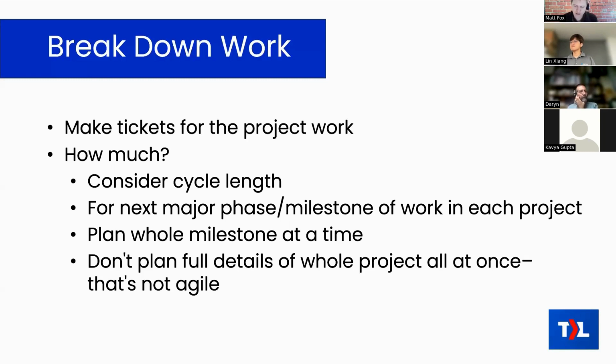And I would advise against planning out the full details of a whole big project all at once, because that's not very agile. If you do that, there are more ways that you might have to go back. As you progress through the project and get towards the end, there's more chance that you're going to have to replan, because you learned things through the project that educate your planning for what's still to come.